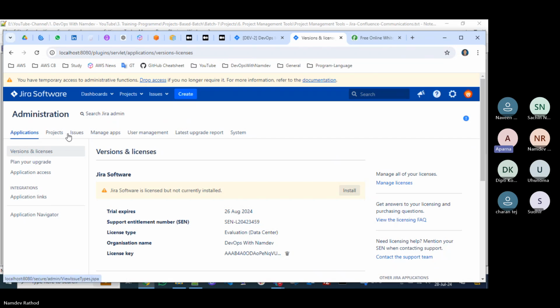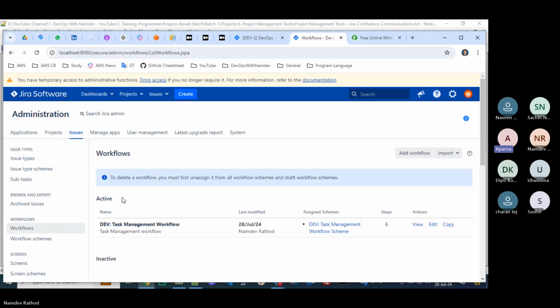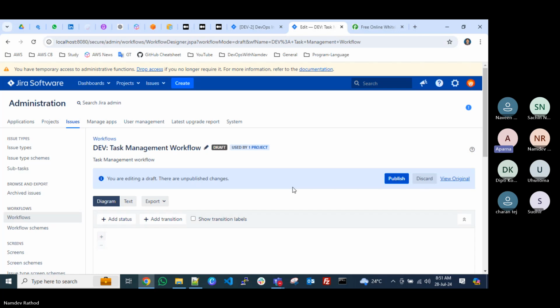Sir, in this case, who decides the priority of the task that is being assigned? Like you were showing high. You can discuss with either your BA or team lead what the priority should be, whether it's a high priority task, or a lower one or medium one. Based on that, you can decide. Normally, if you have a team member like a BA, business analyst, based on the requirement from the clients, he will assign those tickets. But in some projects there might not be a BA or a TL, so someone needs to handle everything. In that case, we need to decide based on the discussion whether this should be a normal case or a higher one.